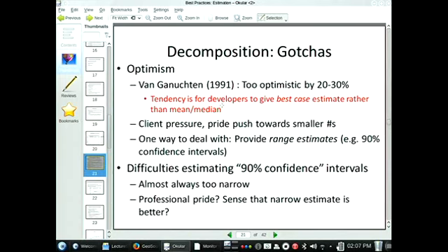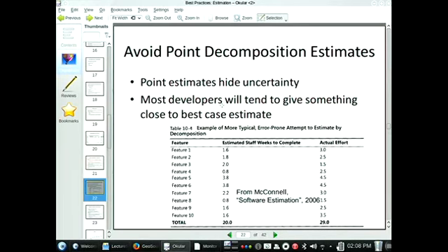Now, it turns out that these error bars, or these ranges we're going to give, are almost always too what? Too wide or too narrow? Too narrow. Just like those estimates we gave for the blue whale. They were too narrow. We were supposed to have wide enough ranges that 95% of the time the true answer would fall in there, and it actually fell in there maybe 20% of the time. 80% of the time, it was outside of them. The wider it would be, the larger the fraction of time it would be in there. So we're going to tend to underestimate, and there's ways of correcting for this that I'll allude to.